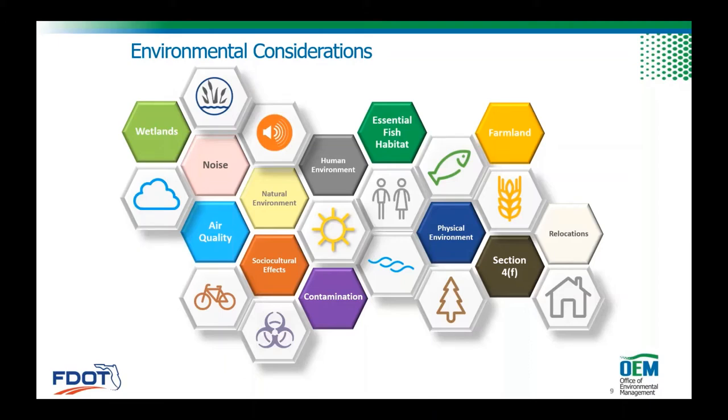And when a screening event starts, whether it's a planning or a programming screen, that information is available to those partners. And when they get a form and a notification that says a screening event has begun, and we ask them to start doing their research and coming up with their agency's official commentary, they've got a spot where they put in their agency's official responses, and right above it is our preliminary environmental determination. So here's our assessment, and then we ask them to do their assessment, and part of what we ask them to do is confirm what we tell them.